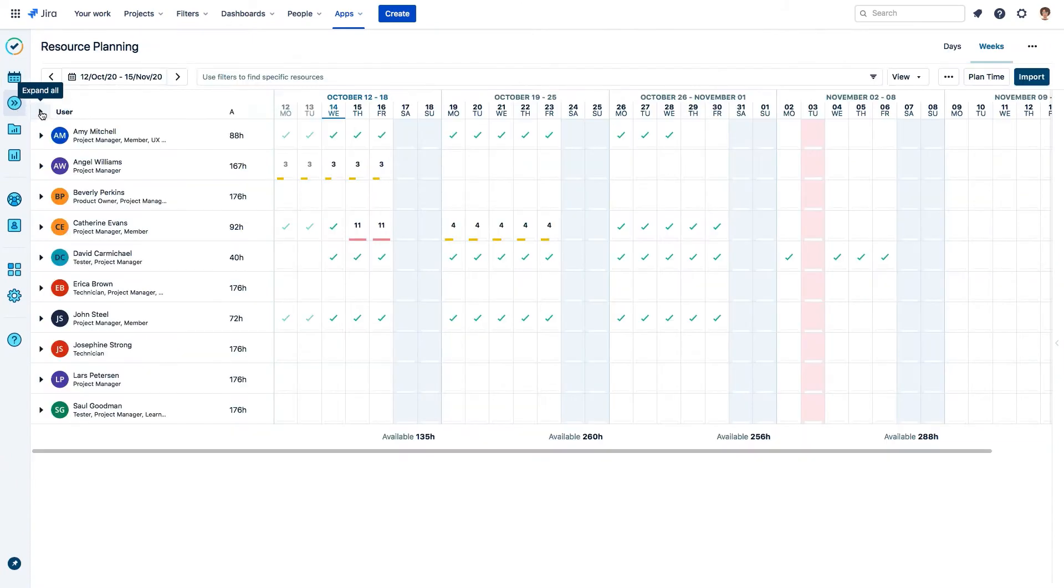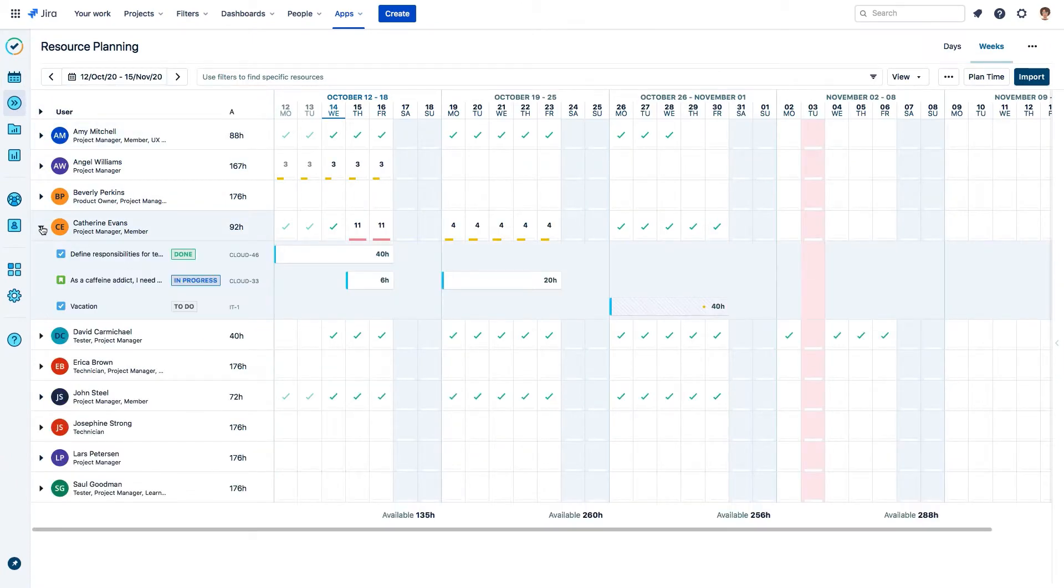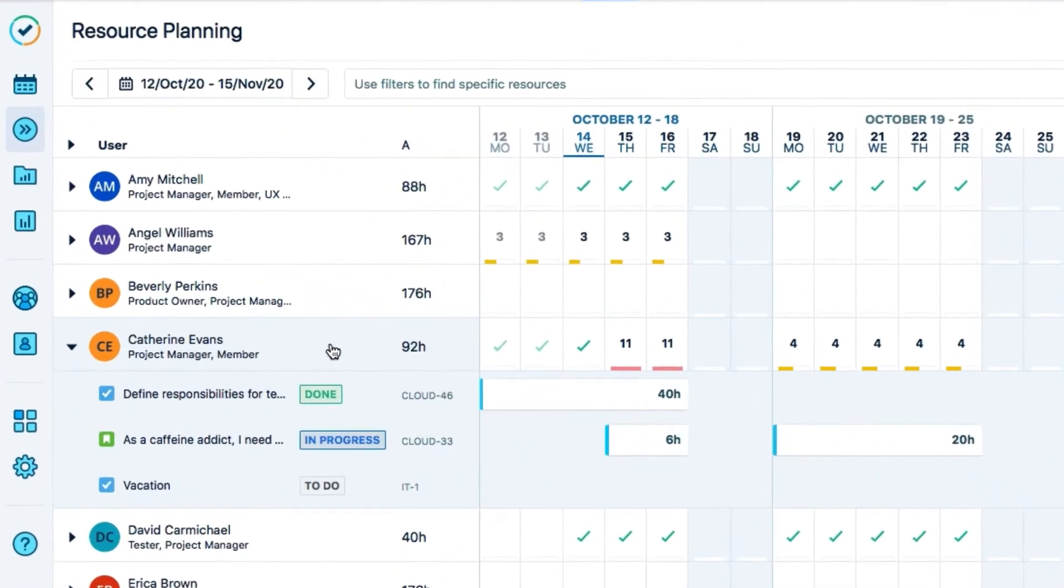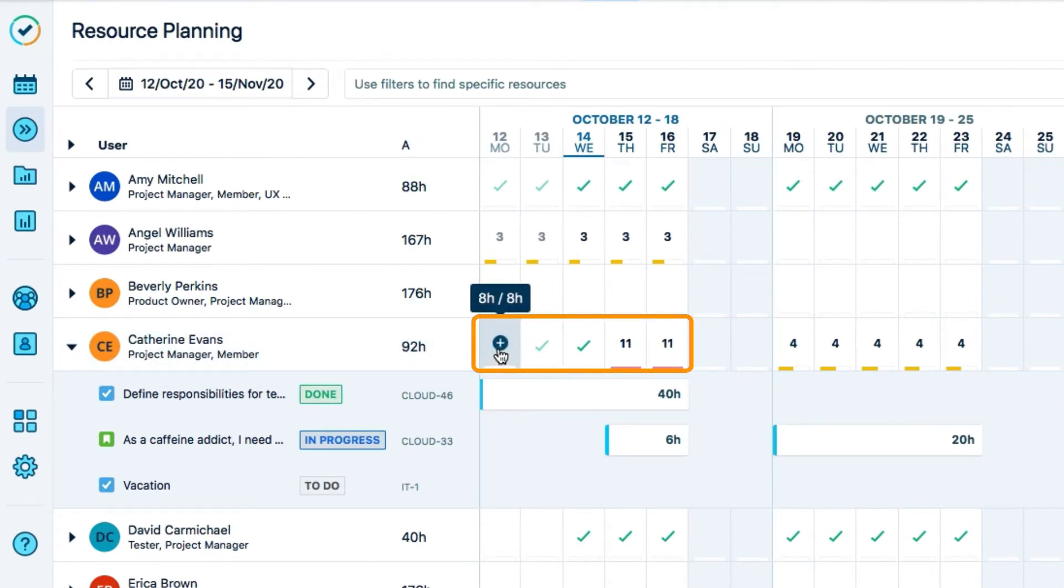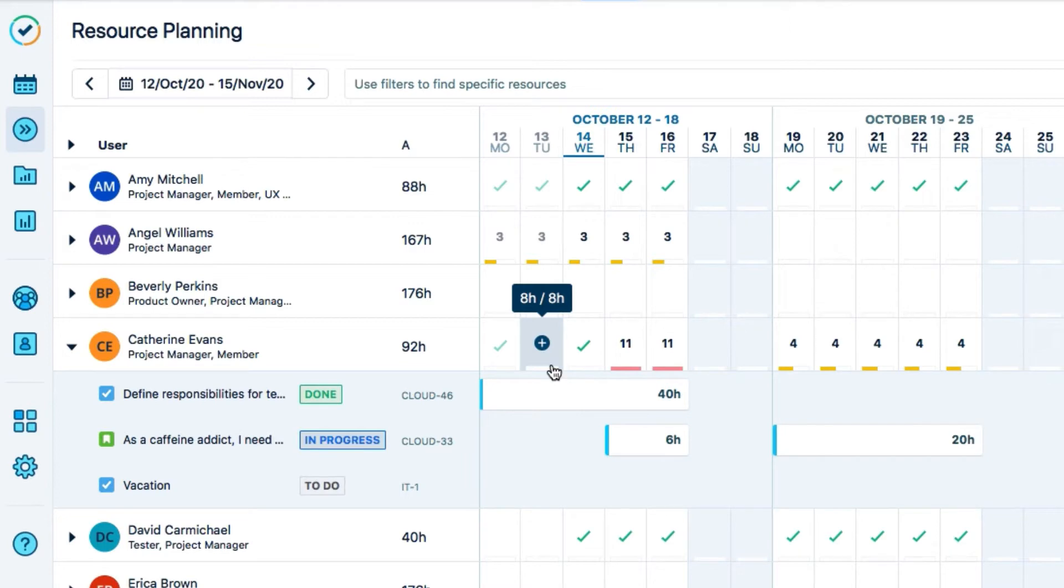In Tempo Planner, the workload scheme is evident when I see my planned hours. Each workday in the resource planning view shows that I have 8 hours available. And when I have planned all these hours, I get a green checkmark.